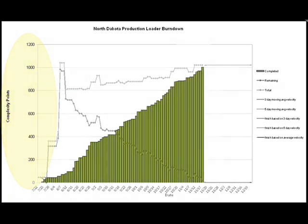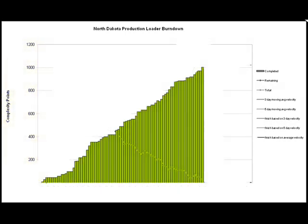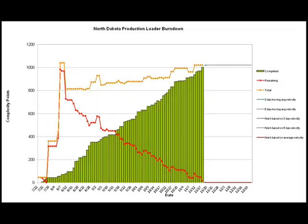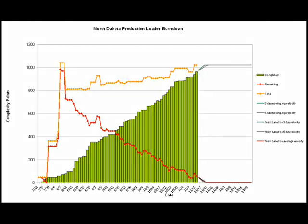The green bars show completed stories. The orange line shows total points — this line goes up as we add or estimate new stories and only goes down when the customer decides to cut stories from a release. The red line shows remaining work, the total minus the completed. In this view at the end of the project, you can't really see one of the most interesting and useful planning indicators, which I call the velocity or estimated finish lines.